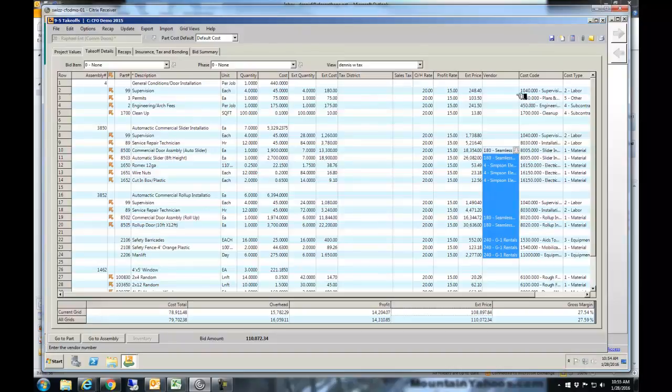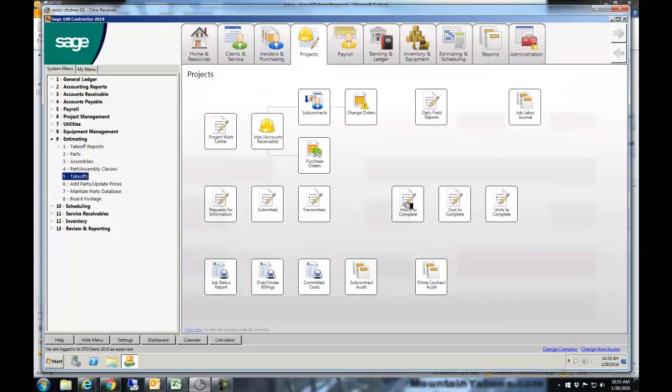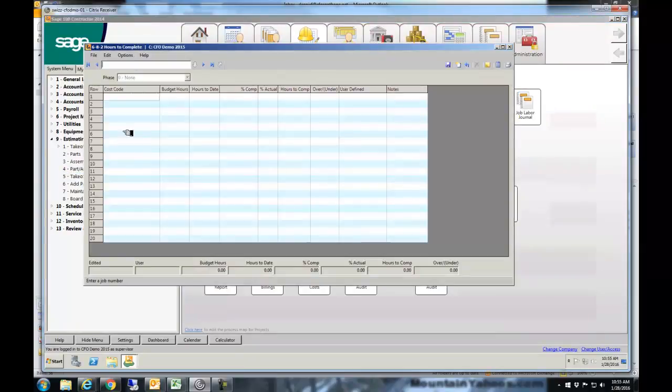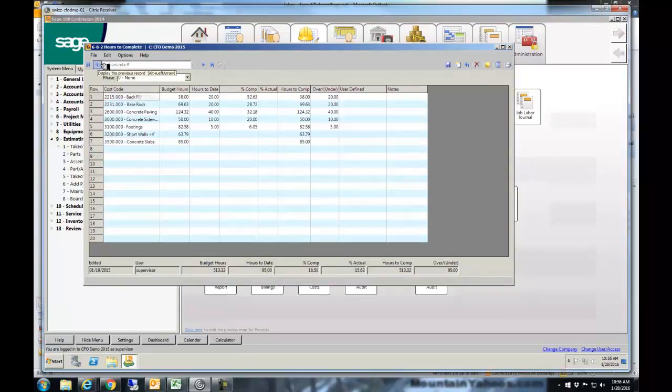But the debits and the credits are pretty much anybody can do. What we add to that is some really good job costing. And if I just go in here, I'm going to pull up an example of just two that may be useful for your client. It doesn't make any difference what these items are, but from my estimate, I had imported this number of hours that I had in my budget. These are the hours that have been processed through payroll. This here is simple math. It just says I've used some percentage of the available hours.